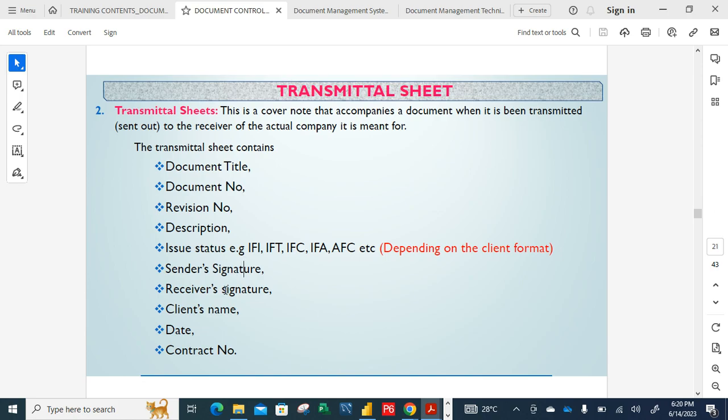Like I mentioned earlier yesterday, a discipline engineer does not have any right to interfere with the document controller of the client. If you want any information, you talk to your document controller. The discipline engineer of the contractor talks to your document controller internally. So your document controller internally does the work. The document controller is the middleman, right? The middleman where communication is being transferred. You transfer communication to your document controller, and your document controller internally pushes it to the document controller of the client.